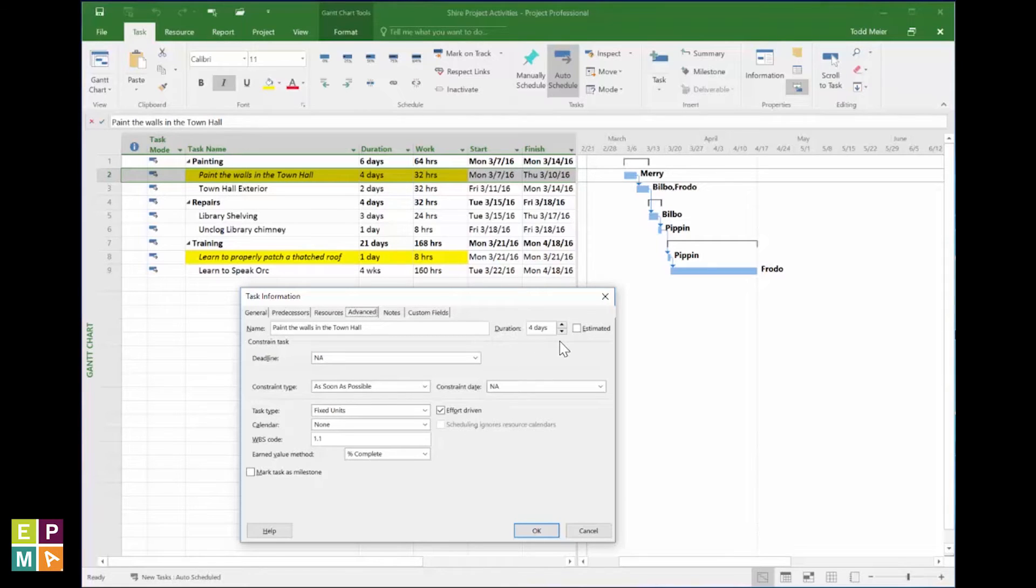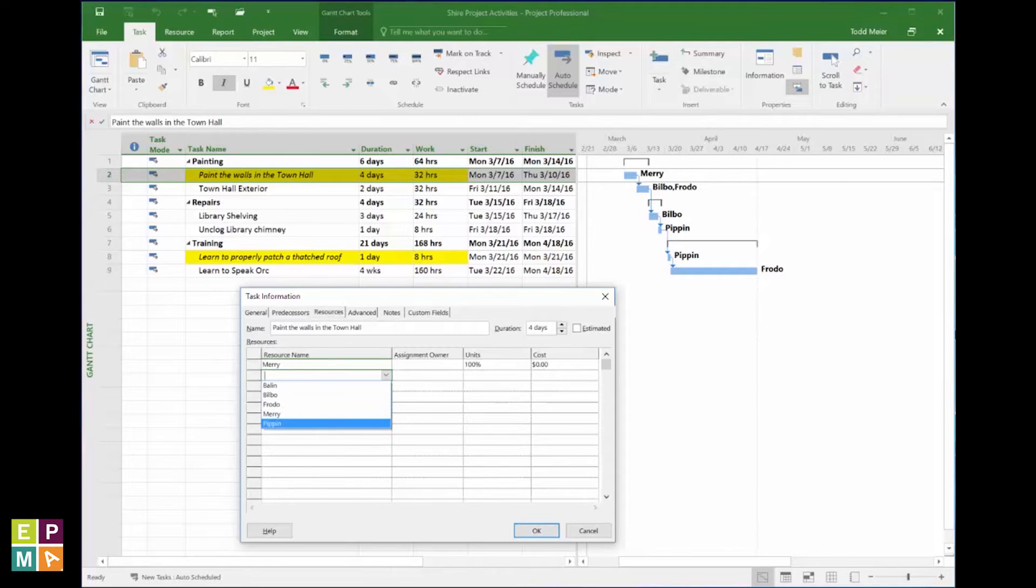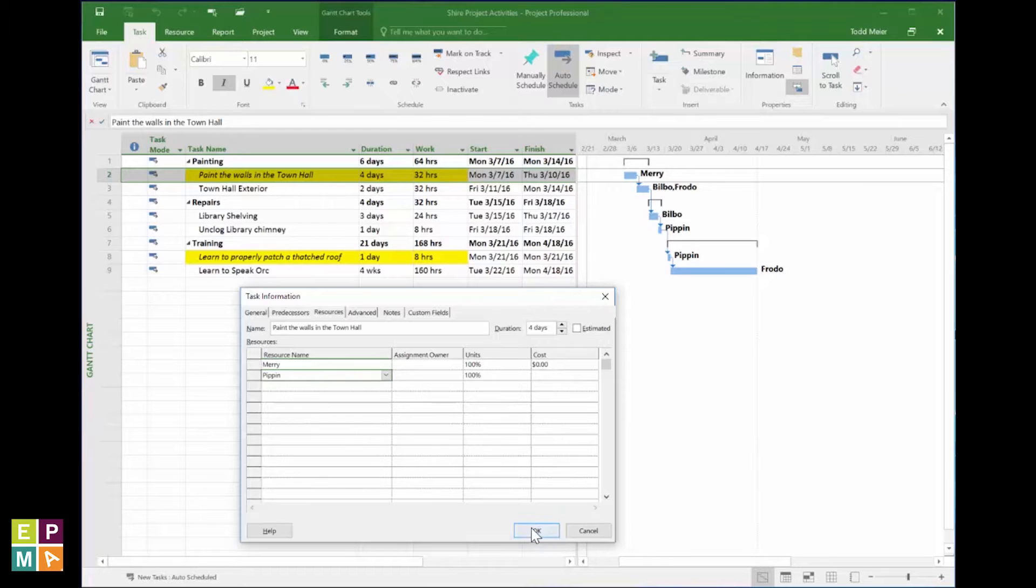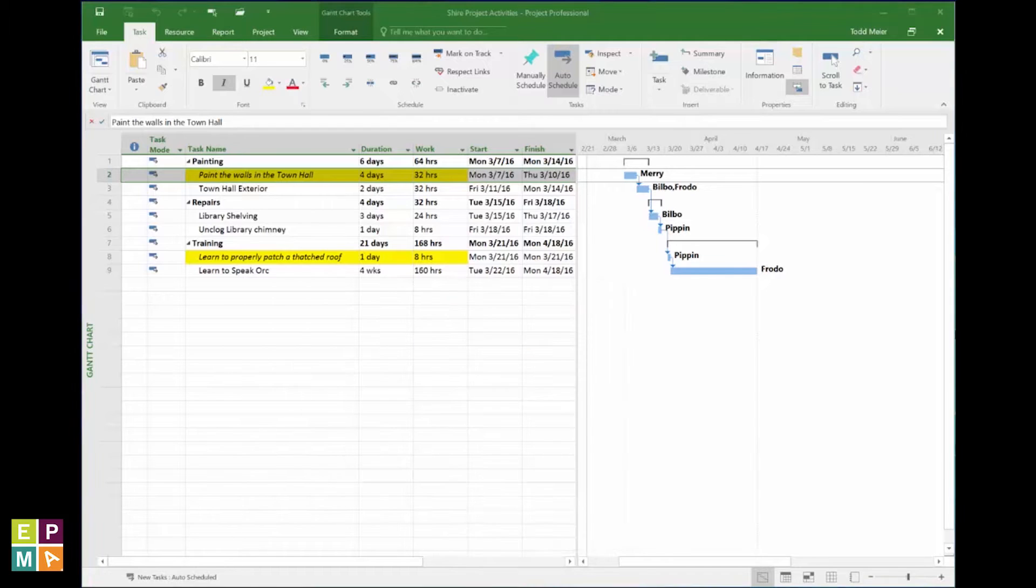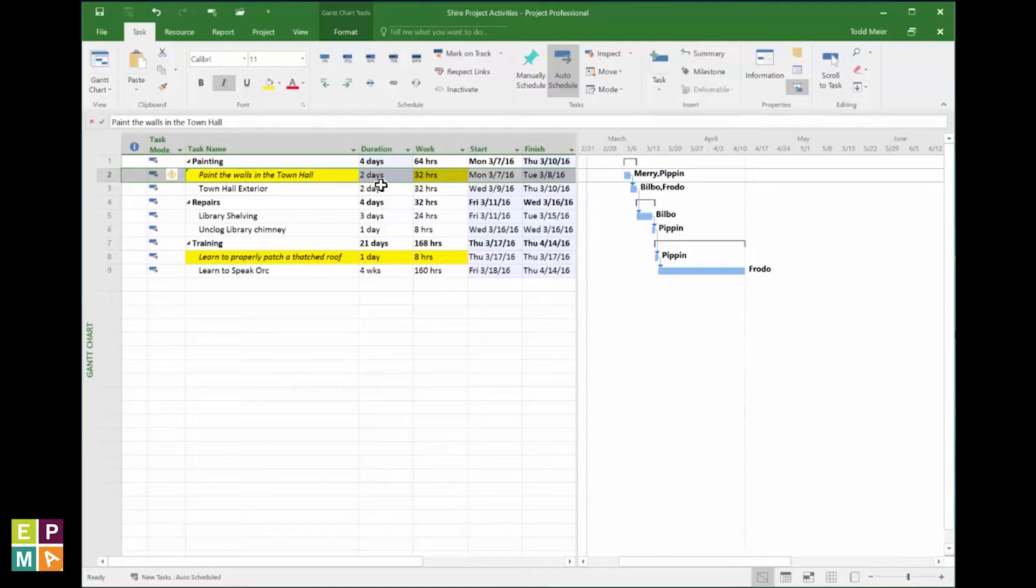From the Resource tab, I'll add another Hobbit full-time and click OK. Behold! The decrease in duration from four days to two days evidences the effectiveness of the effort-driven spell.